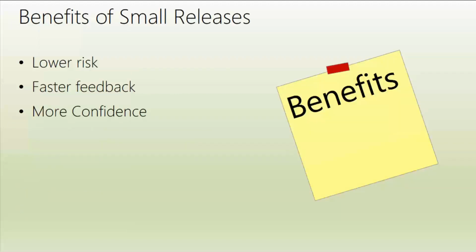And finally, the benefits of smaller releases. A smaller number of releases over time lowers the risk, because these releases go through the dev process, the QA process, for example, or to the customer just to take a look at when you're in the UAT phase in the project cycle and whatnot. So it lowers the risk, so you can correct and fix things as you go along, instead of developing the entire set of software, handing it over, and then finding out, well, it doesn't work.